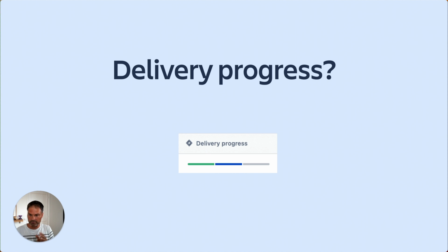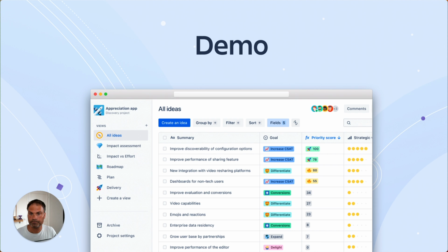What's important for us is how's the experience? Are users using it? Are they adopting it? Do they understand how it benefits them? Does it benefit them? Have we validated that? This is the stuff that's important. So we tend to think of it more in terms of it's on track, it's off track, or it's at risk, and there's some commentary around it. But no delivery progress bar. In fact, we rarely go to the end of the backlog on any given epic. At some point we stop when it's good enough.